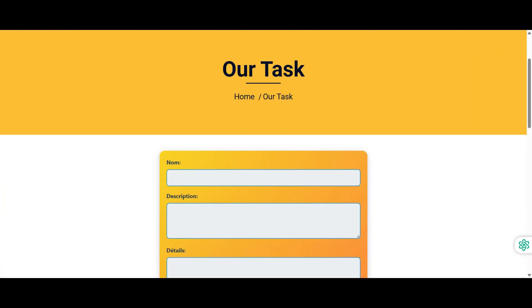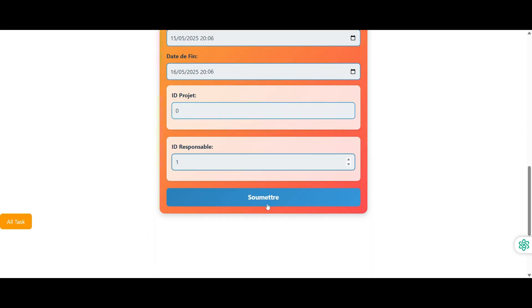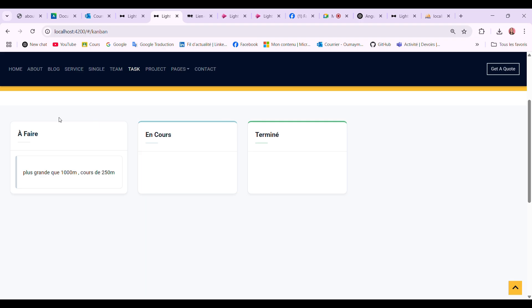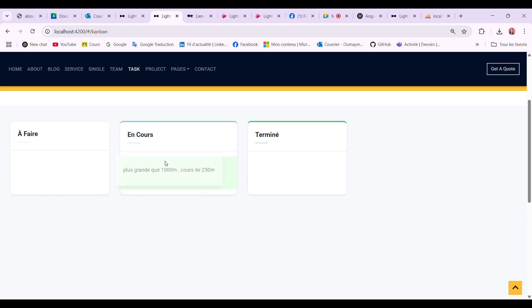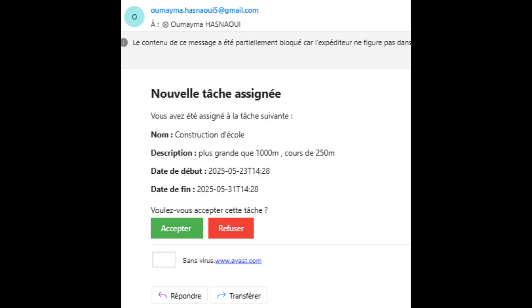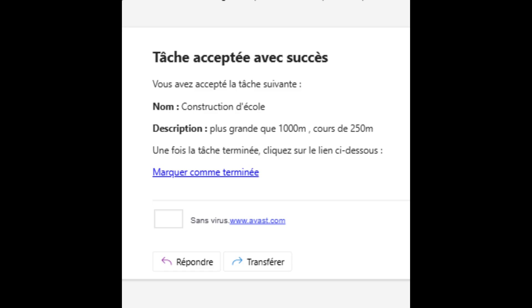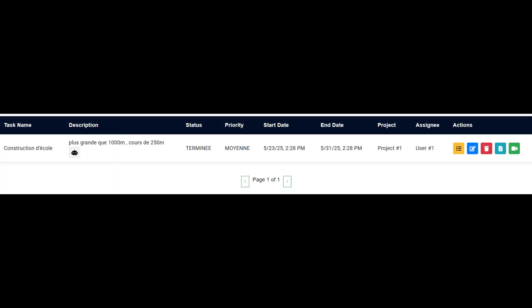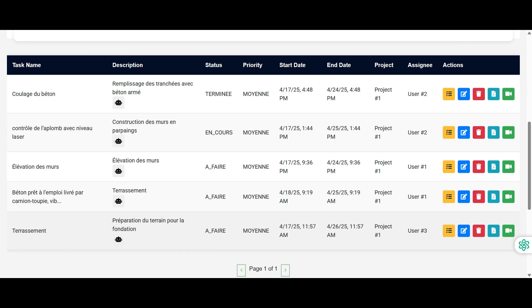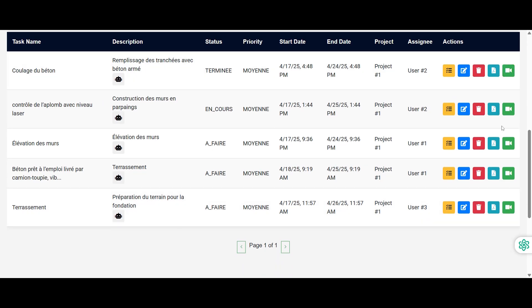In the task management module, new tasks are automatically placed in the to-do column of the Kanban board. Tasks can then be moved to doing or done via drag-and-drop functionality. When a worker is assigned a task, they receive an email notification and can either accept or decline it. The manager is notified of the response.